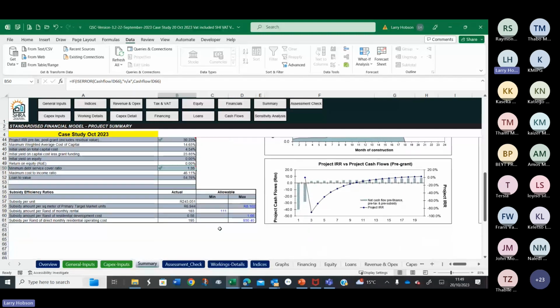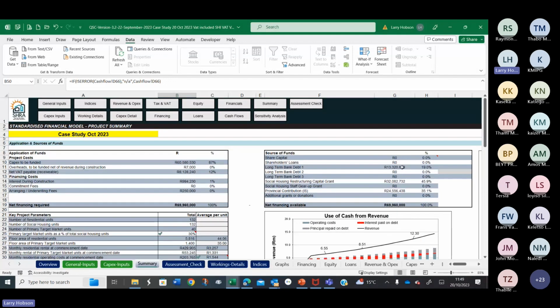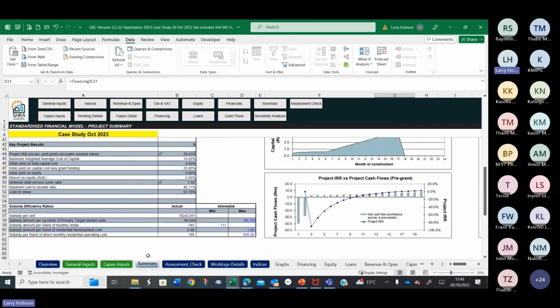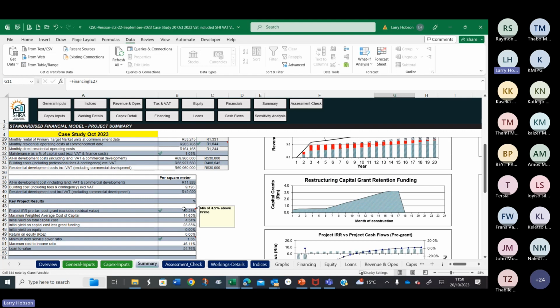Borrowing 13 million. There are 132 projects in this scheme, so the 13.2 million divided by 132 gets you to 100,000 per unit. And let's look at our ratio here now. We're meeting our target, so we're meeting our debt service target. We're making an unbelievable IRR, 30%. Okay, but our most important indicator is to keep ourselves afloat when the time comes to repay the loan.